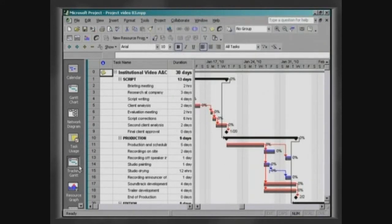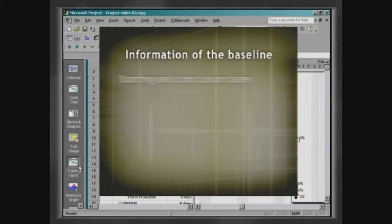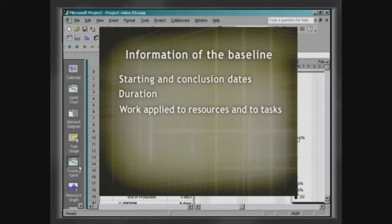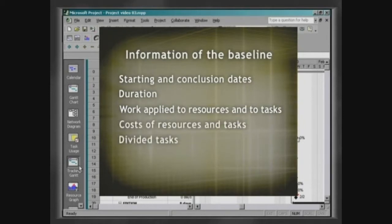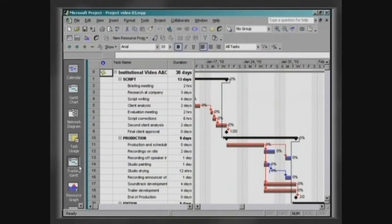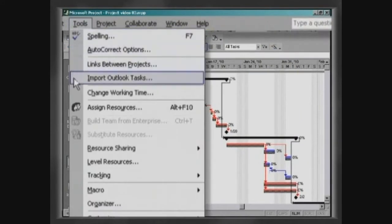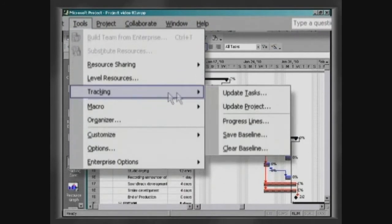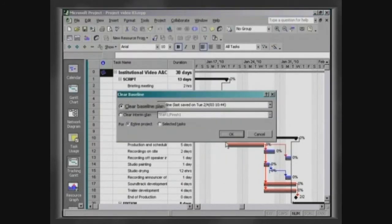The baseline saves the following information regarding a project: starting and finish dates, duration, work applied to resources and to tasks, costs of resources and tasks, divided tasks, work divided into stages, and costs divided into stages. In case you need to clear the baseline, click on Tools, Tracking, Clear Baseline. Click on Clear Baseline Plan and then on OK.